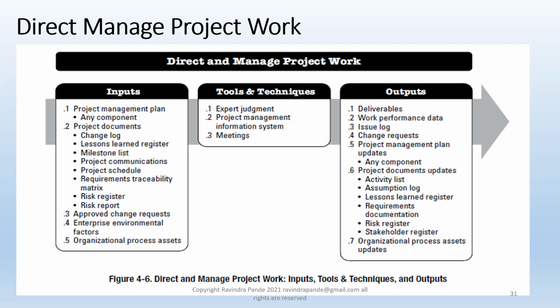And for all such committed work, the normal efficiency figure might get disturbed. So we need to understand this work performance data in terms of a resource completing work on time, and we normally collect all these numbers from timesheets, with the number of hours allocated for that task and the actual number of hours or minutes we used to complete that task, activity or work item. And that's how we build our work performance data reports from the project management software itself.